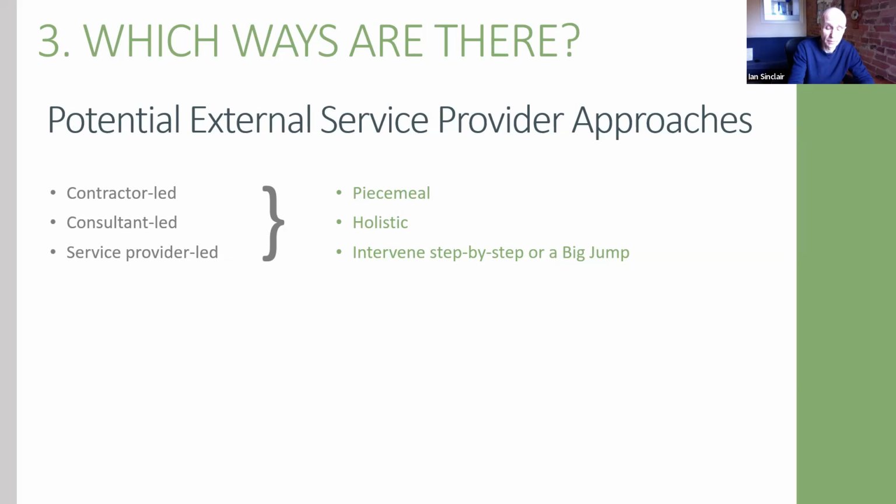Again, we've talked about heat pumps. Adding heat pumps to a building is relatively invasive and expensive. But if you've got a poorly performing building envelope and you're looking at doing some re-insulation or some ceiling or some window replacement, you do that, you reduce your building load. Reducing your building load reduces your future heating and cooling requirements. That therefore means you have a smaller heat pump system. I think we're familiar with measures that can be interrelated.